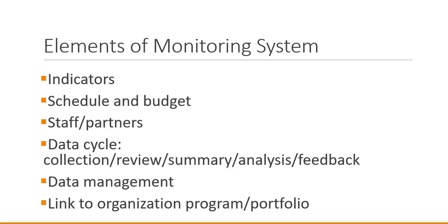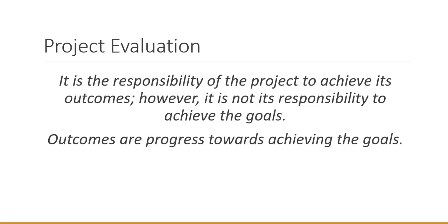of the organization. As we move into project evaluation, an important consideration is that thinking through the logical framework of activities to outputs to outcomes to goals, at the project level, our responsibility is up to the outcome level, not to the goal level. We want to achieve the outcomes to work towards the goals, but our focus, our accountability is for the outcomes of the project.